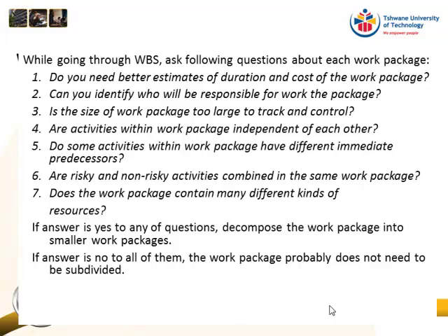All right. So you can see that as you go on with the next steps, you will also start refining your work breakdown structure. So it is an iterative process. It's not here it is and now let's just go on. If we've made a mistake, we must go back and fix it. And that's also why we don't put sequence information in the work breakdown structure, because that means we go back and have to change the numbers all the way, and it really becomes irritating. Okay, so are risky and non-risky activities combined in the same work package?